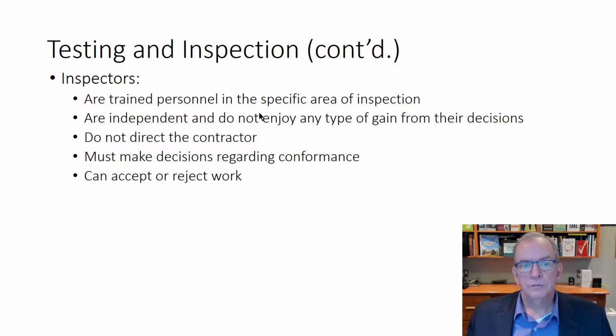So inspectors have the expertise to inspect the work. They're independent. They're not biased. They're not influenced by something. So that's very important. They do not direct the contractor, they must make decisions regarding performance, and they can accept or reject work.